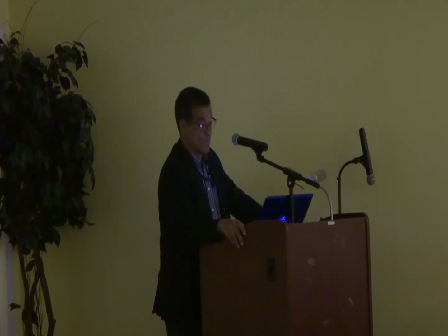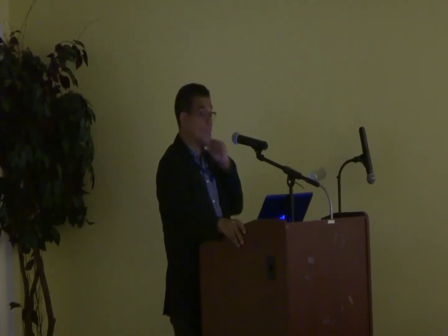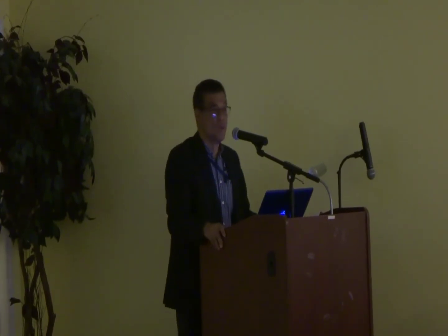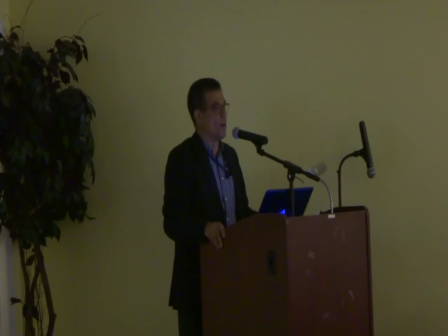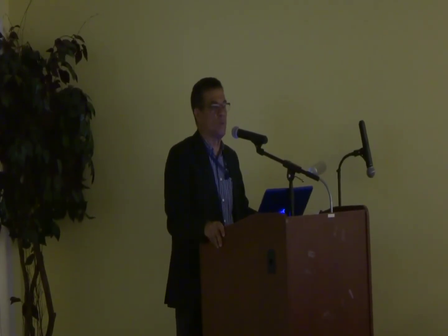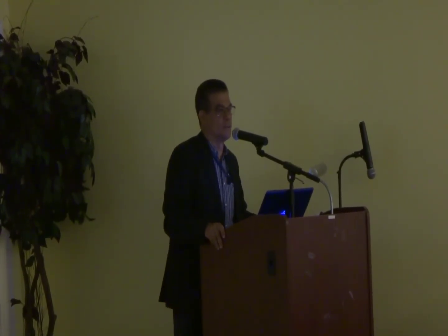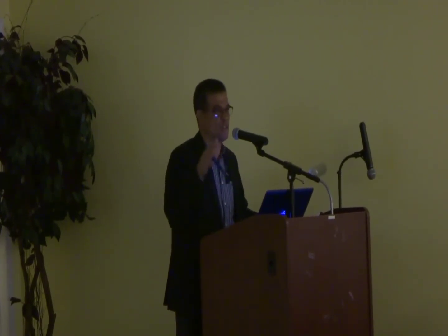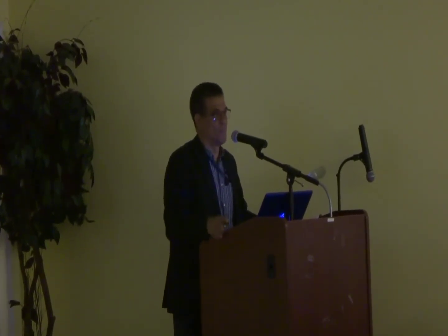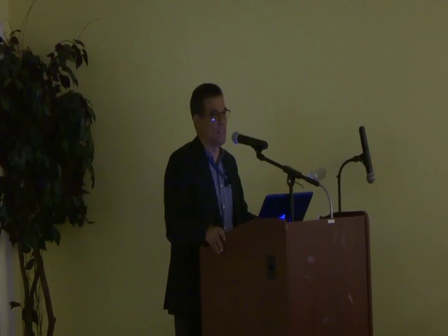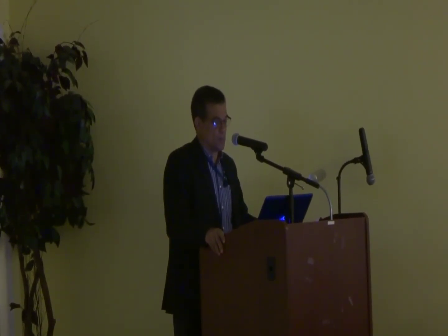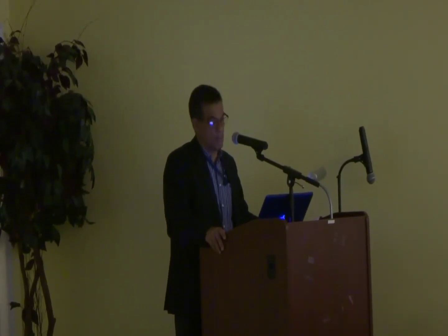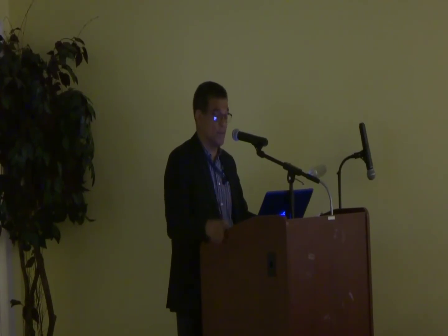And then you have design build, quality 3. Design build usually gives very poor quality. That's why it's used primarily on very industrial projects where aesthetics and finish and level of quality is not that great an issue. Okay? Whereas it's not that fast either. Okay? But it's faster than traditional.